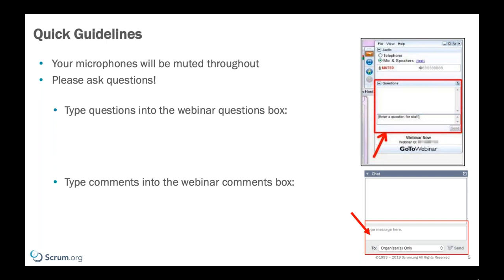You don't know that stuff up front. You need to have, I have 42 engineering teams. That's my budget because I know exactly how much that's going to cost. And I'll allocate those 42 engineering teams to whatever the next most important thing is on a sprint by sprint basis. Now that may not change hugely over the period of the sprint, but maybe you need to move three teams from one product to another product because we need to show more progress on this other product.